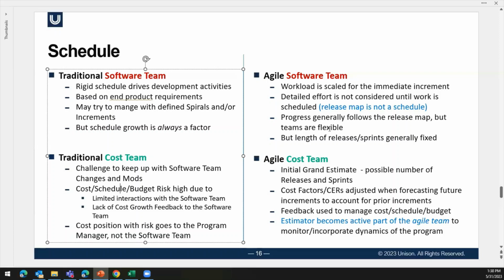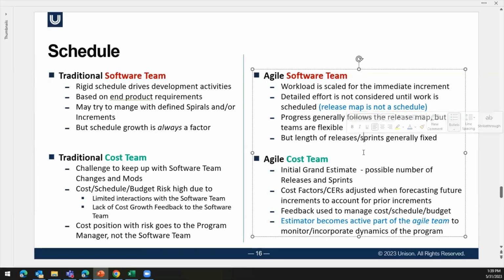And those are going to be developed through a number of sprints. And the sprints will maybe have, you know, these 15 things in them, but maybe in the end, it'll only have 10 of those and 3 of something else. So you have to be flexible. The only thing you can depend on is there will be teams that have skills that can be converted to a velocity that will tell you what type of code can be developed over periods of time. And therefore, that leads to a cost estimate.